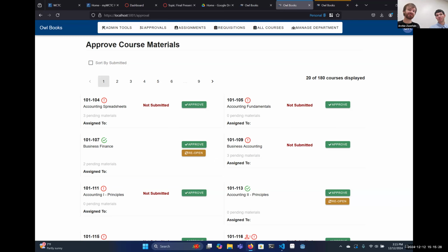They were really big changes because they were affecting the entire project. Being separated for such a long time with the code, getting them put back together where we weren't stepping on each other's toes was a big challenge, and learning how to navigate that and break things into smaller pieces that could be implemented sooner, so we didn't make it harder for ourselves down the road, was a big learning process.